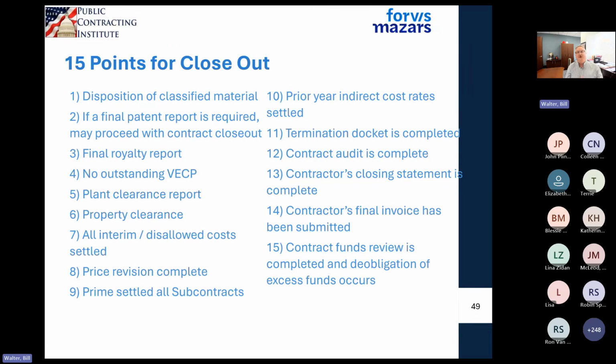If you have an agreed to rate in your contract that says, hey, we're going to do materials plus 10%, we don't see that too often. Some people say it's a cost plus percentage cost contract. We'll bring attorneys in to help discuss that. But if you have a markup that's built on top of your indirects that can't change with a closeout, then there's really not a need to do the final closeout.